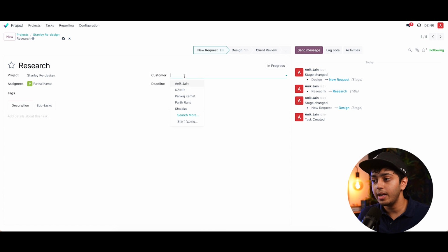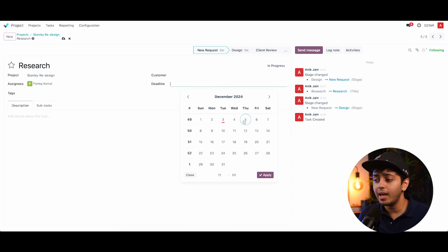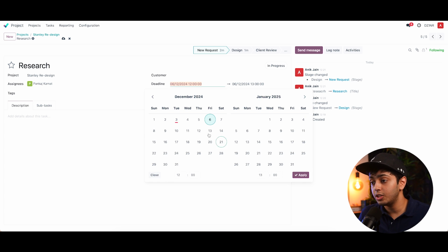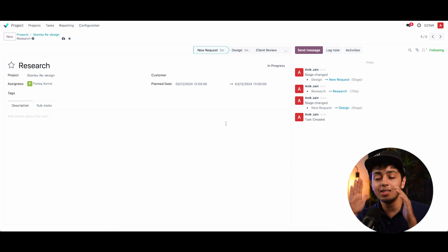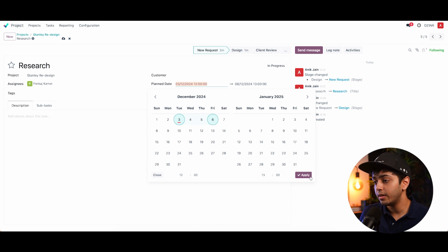We have the customer right here. We can add it if you want to share this with the client. If you don't want to, you don't have to. Here we can set deadlines. Let's say I want Pankaj to do the research by Friday. So I'll just add a 6 to it, and the start day is today. I want him to start working today. So I'll apply this. So he now has a nice timeline to work with. He will start the work on the 3rd and end it by the 6th.